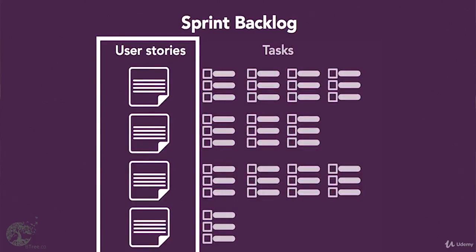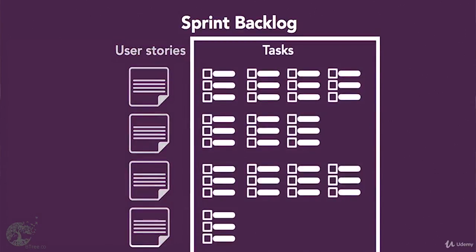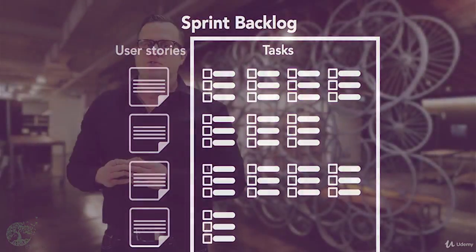The tasks are defined for the team's understanding. They do not include everything every person on the team does every hour of the day. They are defined more at the level that shows the daily progress and helps the team work together and manage dependencies. Inputs in preparing for the sprint planning meeting include the top priority user stories with the definition of ready completed. The meeting follows an agenda that creates a conversation about the sprint goal, and it defines the tasks and the team's commitment to the sprint.